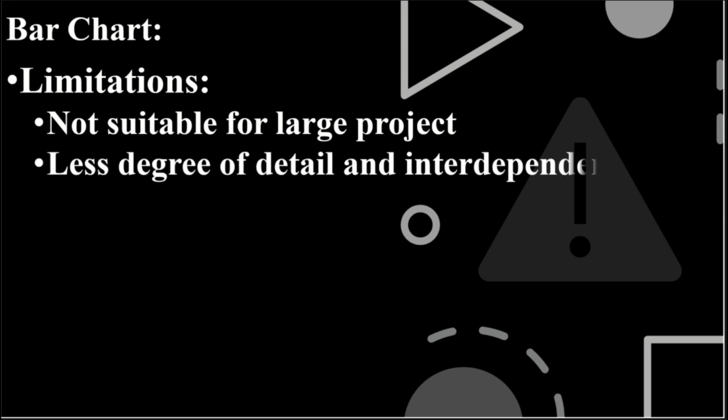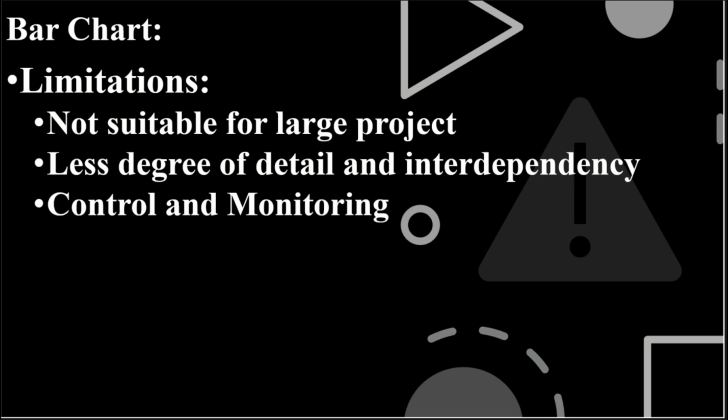While bar charts have many benefits, they also come with some limitations. As projects grow in complexity, bar charts become cluttered and difficult to manage. Bar charts do not show detailed interdependencies between tasks, making it hard to track complex workflows. For large-scale projects, bar charts do not provide advanced monitoring and control features like other project management tools.